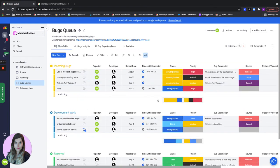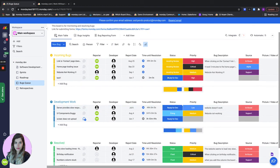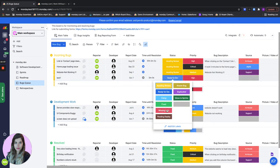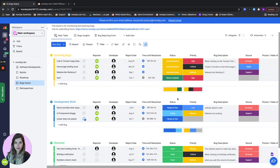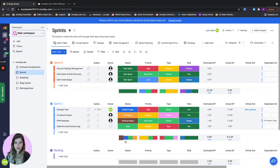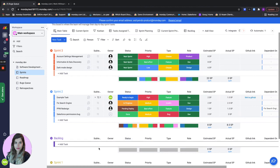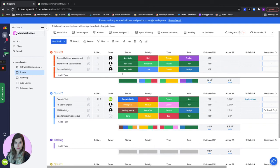When a new bug is coming in I can also decide that it's actually going to go to the sprints, so if I don't want to deal with it right now I can move it to one of our sprints. When I click on move to sprint board it's actually going to go ahead and move it to the sprint board and then I can go here into the backlog and start managing here as one of the items in my sprints.